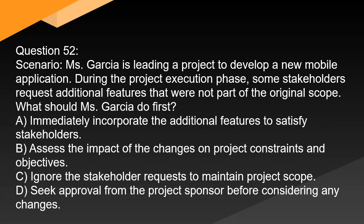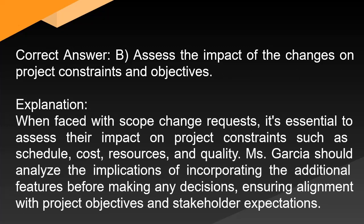Question 52: Ms. Garcia is leading a project to develop a new mobile application. During the project execution phase, some stakeholders request additional features that were not part of the original scope. What should Ms. Garcia do first? A. Immediately incorporate the additional features to satisfy stakeholders. B. Assess the impact of the changes on project constraints and objectives. C. Ignore the stakeholder requests to maintain project scope. D. Seek approval from the project sponsor before considering any changes. Correct answer: B. Assess the impact of the changes on project constraints and objectives. Explanation: When faced with scope change requests, it's essential to assess their impact on project constraints such as schedule, cost, resources, and quality before making any decisions, ensuring alignment with project objectives and stakeholder expectations.